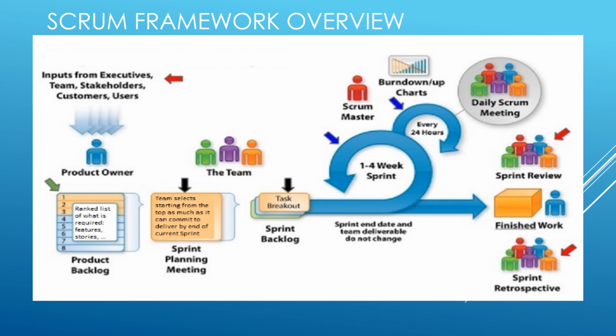The Scrum team is cross-functional, meaning Scrum team members have all the skills required to create value each sprint. The Scrum team is small enough, consisting of 10 or fewer people. The product owner is accountable for product backlog management.